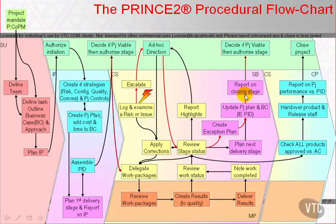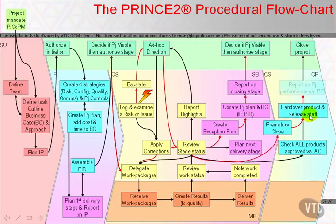The project board may decide that the project should end here and now. The exception report or the results of exception planning may trigger the premature closure of the project through closing a project's activity — specifically, prepare premature closure — which results in checking the status of handed-over products and maybe reclaiming some, releasing staff, reporting on project performance, and then closing the project.